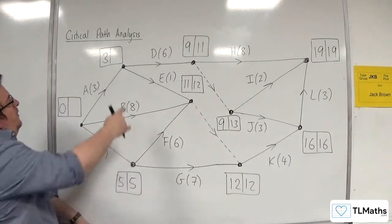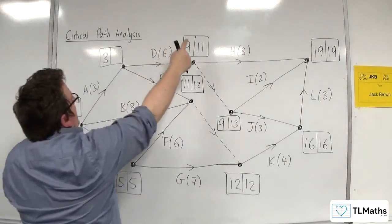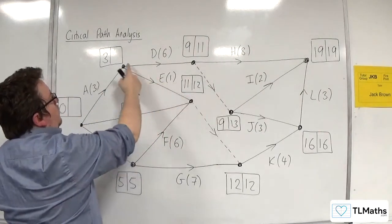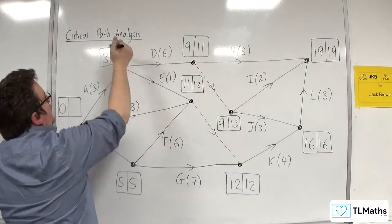So let's do this one now. 11 take away 6 is 5, or 12 take away 1 is 11. So that's got to be 5.